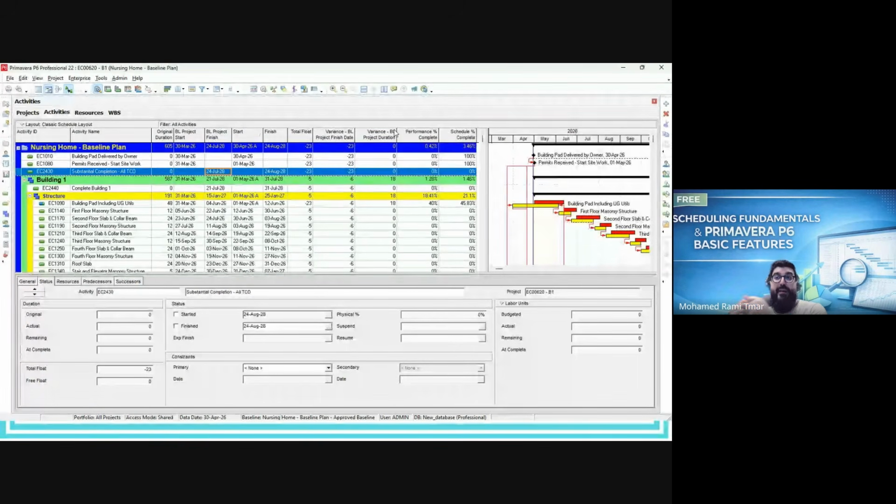But in parallel, maybe he has a problem with the critical activity. So to hide this problem, he will start earning progress in non-critical activity, which is possible. Earning and preponing these activities and progressing the work in non-critical activity, and as a result, he will mislead the KPIs. It's not wrong. What he's doing is correct. He is earning a real progress, but he is working in non-critical activity, and he is keeping the critical activity delayed, which will push the milestone at the end.